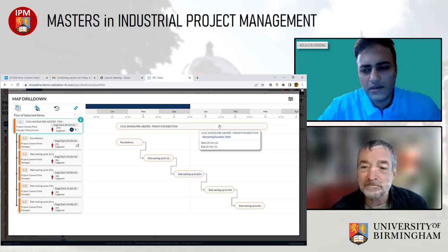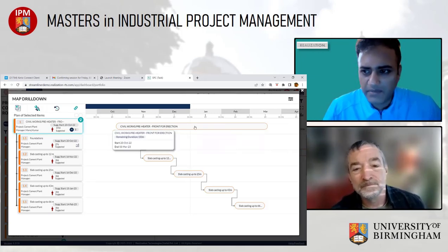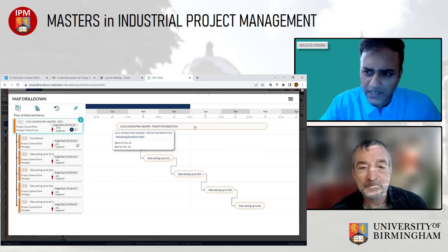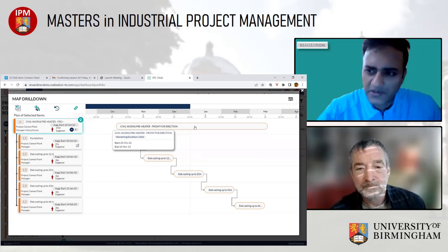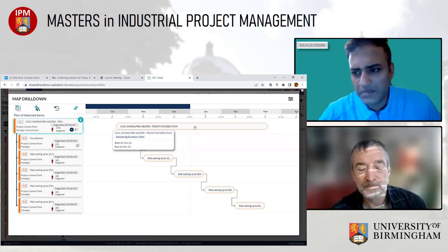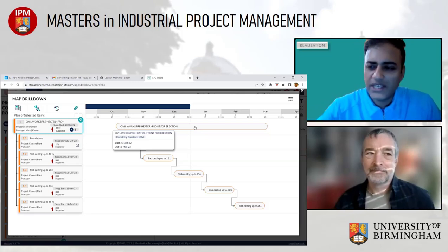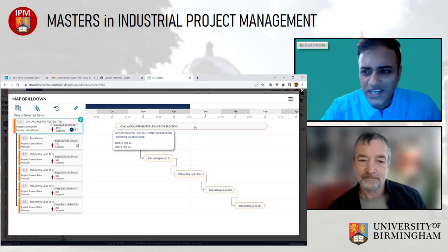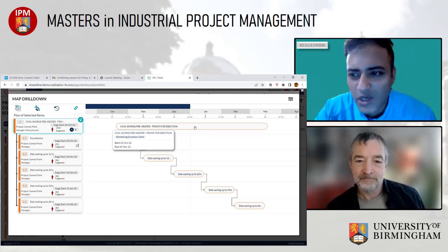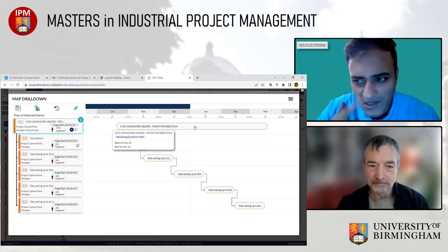Yes. So you can theoretically create this focus and finish level plan in a software like Primavera or MSP, and then have different files which exist for each of the tasks, where you can build your local schedules or you can build your progress reports. But the only thing is you have to connect it back in that fashion. So the local schedule should be subordinated to one of the batches in your parent network. It should not be across batches. Then you don't have a way of coming back.